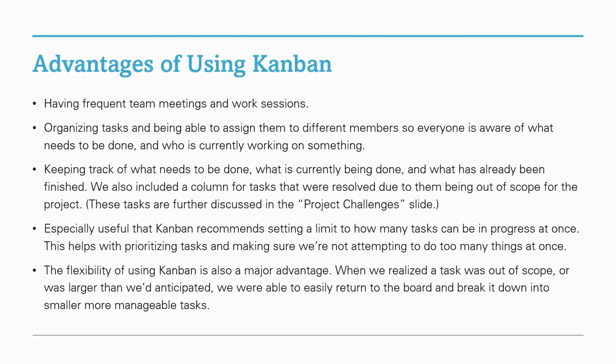Especially useful is that Kanban uses settings. It recommends setting a limit of how many tasks can be in progress at once. This helps with prioritizing tasks and making sure we're not attempting too many things at once.